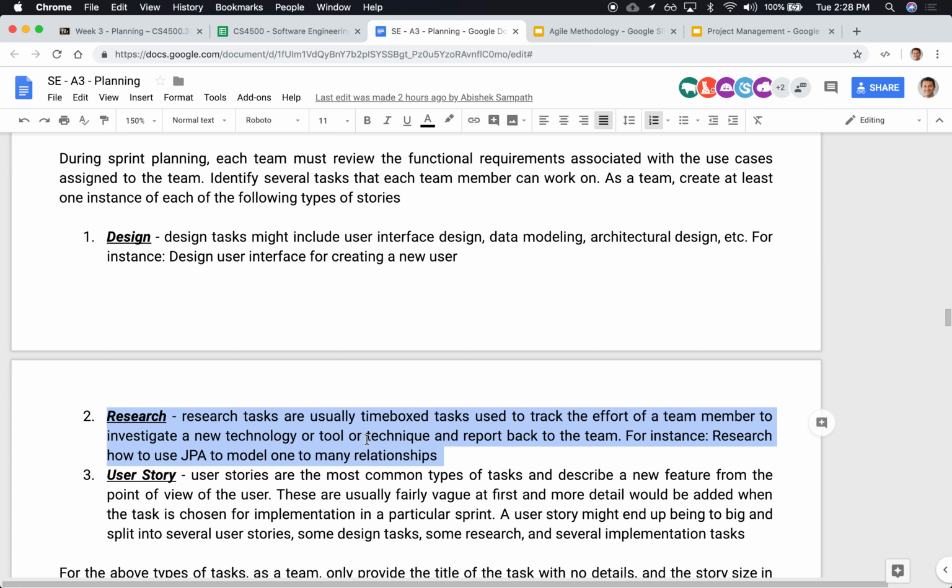Regardless of whether you actually work for 4 hours or 8 hours or 16 hours that day, you're committing yourself to having this done by the next day. So it's not really hours. It's subjective to whatever the team agrees a point means. But a good rule of thumb is to say that a point is 1 day. So if you say that's a 1-point story, you're saying you'll be able to provide this about a day after.